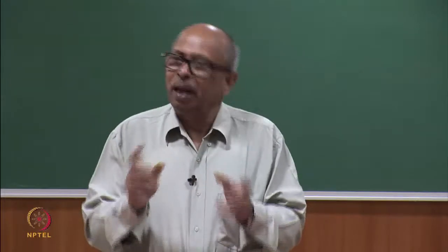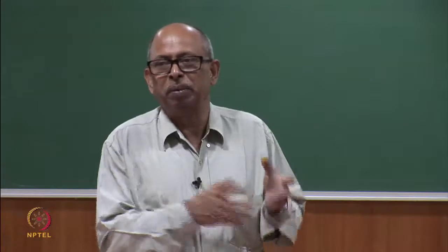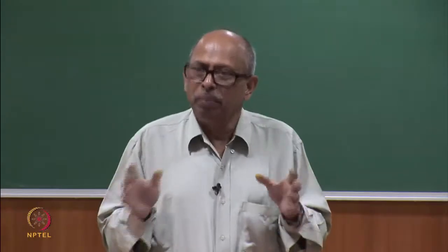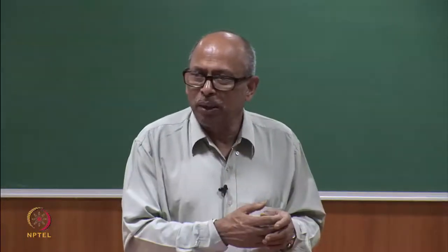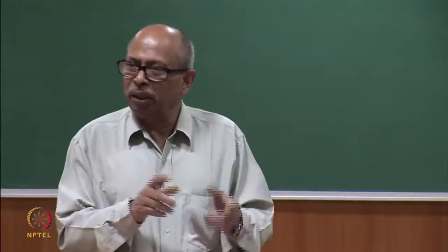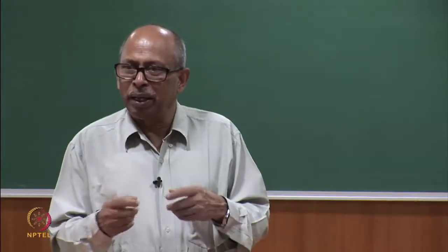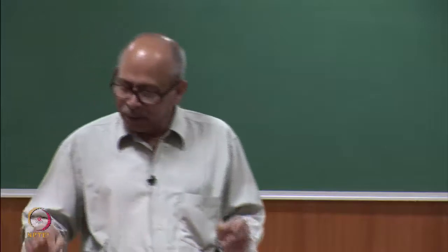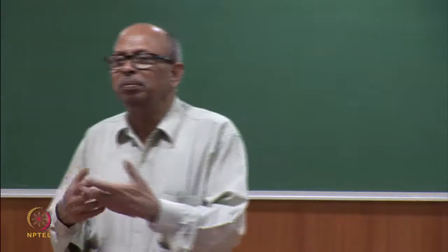First, carpenter's operation, maybe part of it is then mason's work. If somebody is expert in all of them, that is a different issue, but usually I am giving a simple example, there will be more complex ones. Then there is a little bit of mason's work, then the fitter comes in, he fixes it up, checks that it is working fine, right. Maybe carpenter's work is required again, finally the mason will come and do the plaster and things like that. So, it is all interlocking activity, it is not that I come, finish and go away.